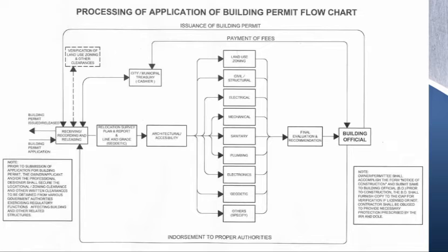Like sinabi po sa Section 302 for the applications of building permits. And the land use for the project should be really specified and verified if the location of the project or the land that will be used in that project is suitable for the project itself. Like for example, magpapatayo ng resort and there is a mangrove sanctuary sa likod ng site para sa resort.